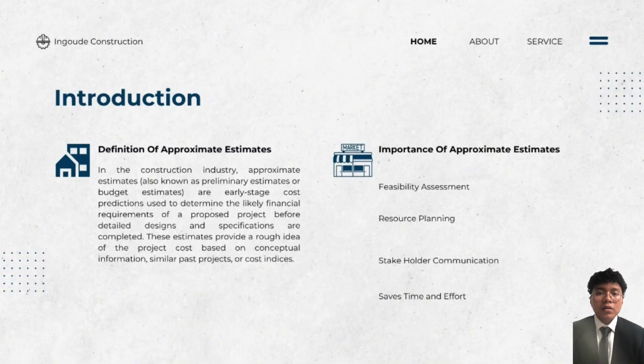Now, let's take a closer look at the importance of approximate estimates in construction projects. First, we have feasibility assessment. At the earliest stage of a project, clients want to know, can we afford this? Approximate estimates give a quick cost overview to help determine if the project is financially viable. If the estimate is too high, the scope can be reduced before investing time in full design.